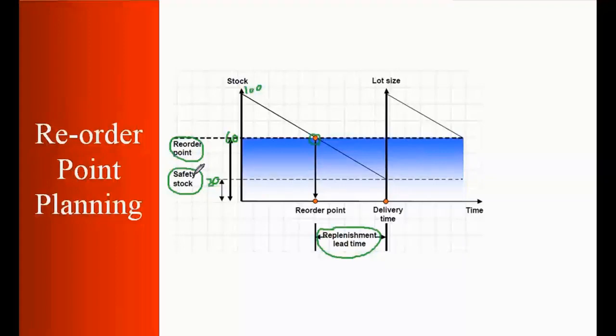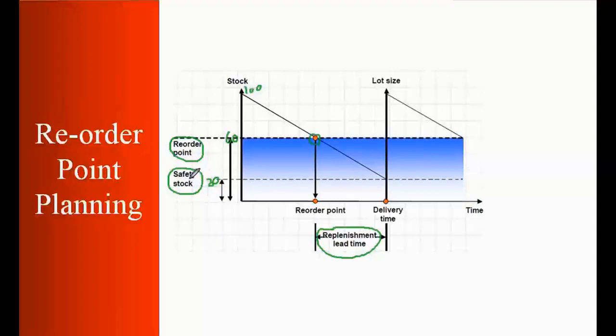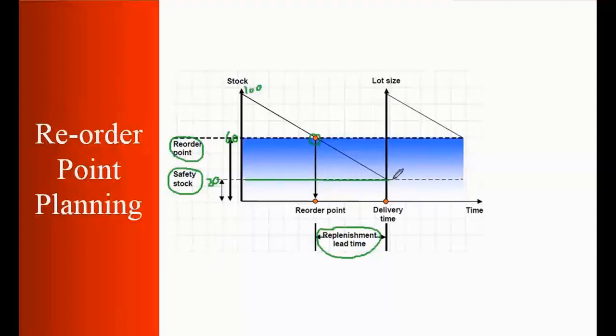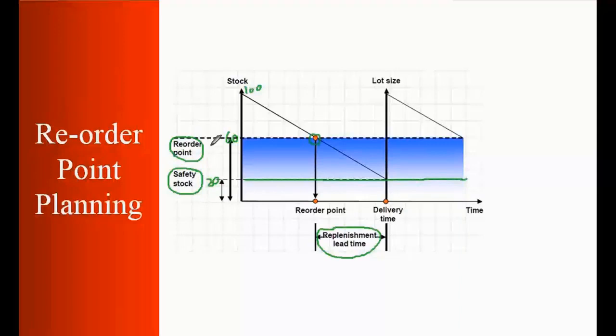We should have some extra stock in our warehouse so that whenever there is a shortfall or whenever there is something unexpected happening, or like the delivery can take more than three days, anything can happen. So in that case, we'll be keeping an eye on safety stock. So we can say 20 pieces of safety stock. So safety stock we need to maintain always. So that is a safety stock which we'll keep here all the time so that in any circumstances where we have some extra requirement or maybe the delay in delivery, we can consume the safety stock, just for rainy days. So that's your safety stock. That's your reorder point from SAP point of view.